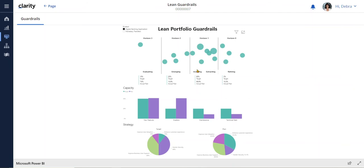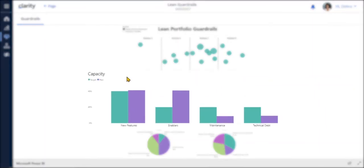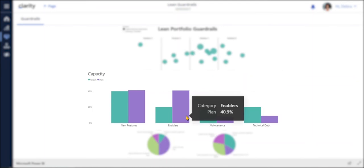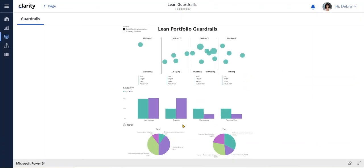The middle shows our capacity. The capacity guardrails indicate the percent of resources that should be allocated to new features versus enablers or maintenance or technical debt. We can see here that we're over-rotating on enablers, which may be a red flag or simply might indicate that new platform work is needed to launch a new innovation initiative.